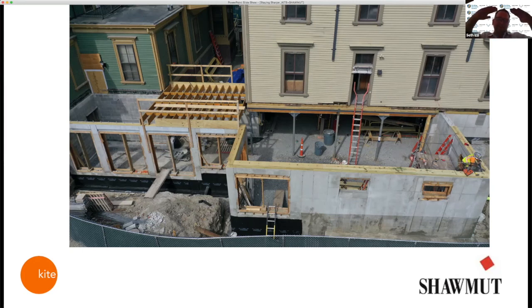And the ceilings on the top floor all came in. I remember going into a professor's office, glasses at the end of his nose, reading a history book. I'm like, you are in danger, pal. You've got to go. So they condemned that. The ceiling was literally sitting on a sprinkler pipe. And that happened throughout the third floor. So there was a very quick emergency plan in place. It's something you just can't foresee, but it is a good example as to why you would do some initial investigation prior to see what your conditions are, even if they look very pretty.